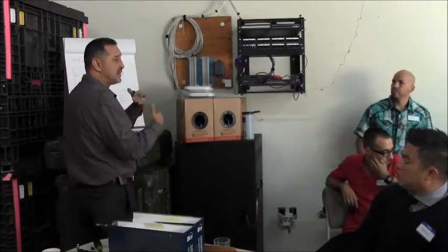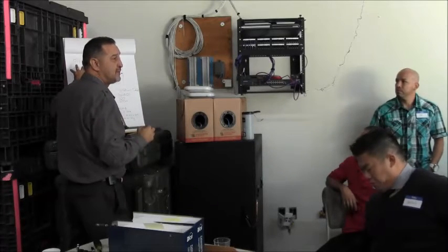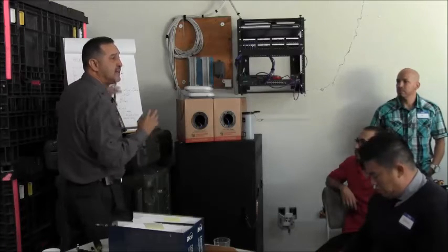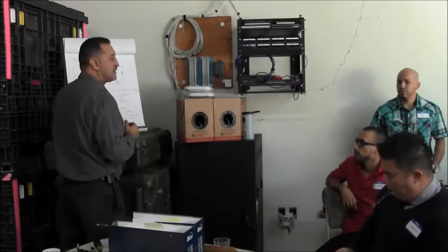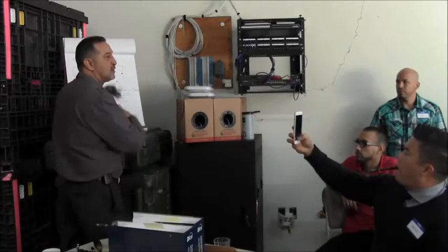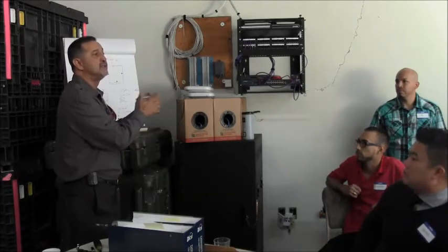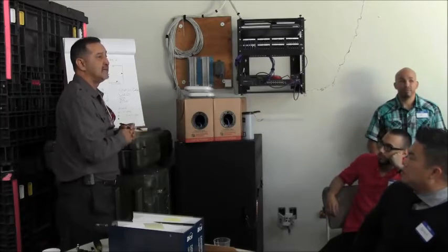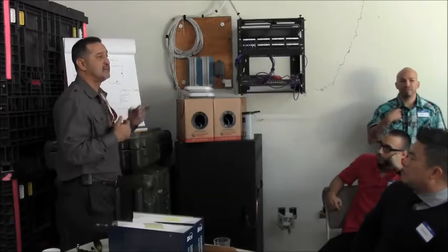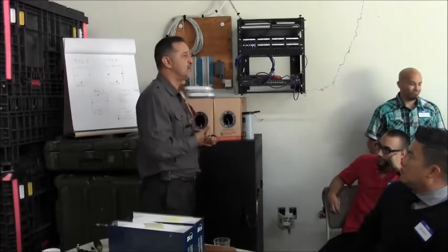So it starts to get confusing too, okay? Those are the things you got to be aware of, because if you got 300 of these in one building and 200 in another, someone's got to keep track. And the print, we'll all label it first. So we'll go 1, 2, 3, 4, all the way up to 300. Okay? And our foreman is going to do that. He's going to be responsible for that. Because if he don't label it right and the customer comes down on me, I'm going to come down on him. And he's not going to want you to work on his job site no more.